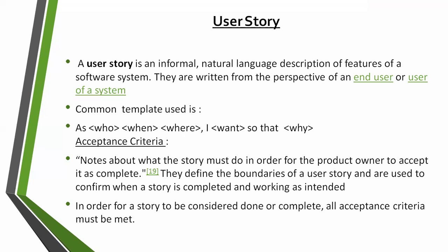So booking an online ticket, right? You give me a user story for that. Booking online ticket for which? Bus ticket, train ticket? Your wish. Movie ticket. Yeah, so as a user, I want to book ticket online so that I can watch movie. Exactly. So this description is telling the whole description of the work functionality which you are going to deliver, right? In a similar way, it has to be short and sweet, simple.